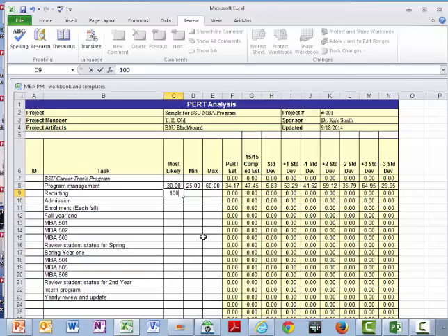I can get all of the students I need or want in the program. And somebody says, no, this program is so cool, it's going to be 25 days. Somebody else says, no, I don't know, I think it's going to be 300 days. So your PERT estimate comes down to be 120.8. Wow. So that means that you take this 3-point estimate and you'd enter for a 50% probability 120 days.